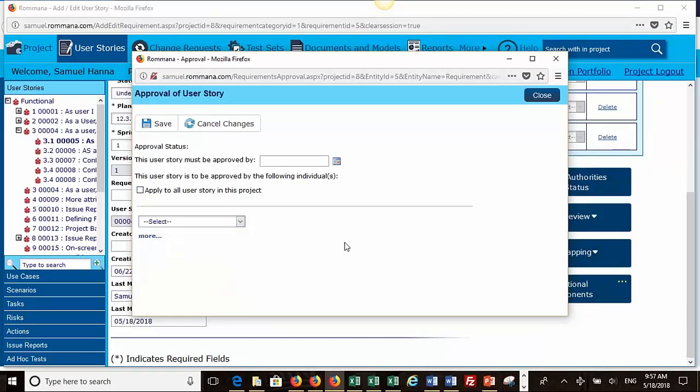And if you have multiple people who are supposed to review it, you can decide if any of them can approve it, or all of them must approve it. And if all of them must approve it, you can even specify the order in which they must approve it. Then you say, for example, Magdi should approve it first, and only after Magdi approves it, then Joe can approve it. But Joe cannot approve it before Magdi. It goes into that level of details.